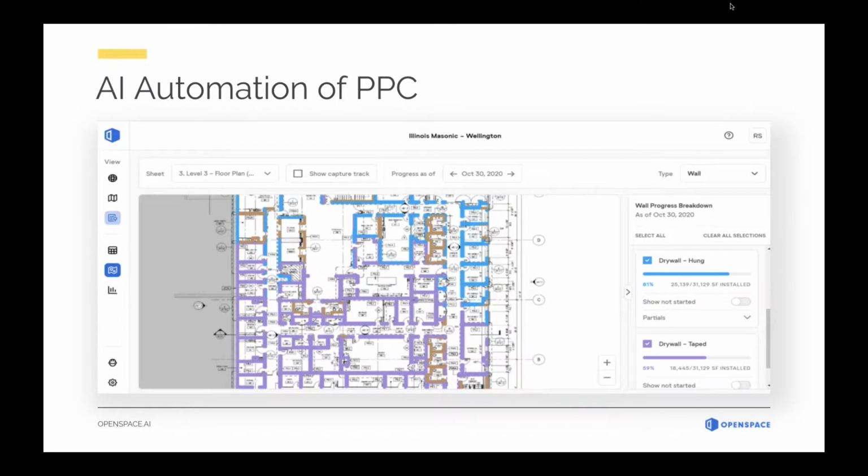The way we do that on the front end is we do need to do an actual takeoff of the building. So you need to tell us initially, okay, there is 5,642 lineal feet of duct on this floor. Then we'll do almost like an on-screen takeoff calculation of that, and then we'll tell the AI, look for this duct, it's in these areas. So we use a mechanical plan to do that.